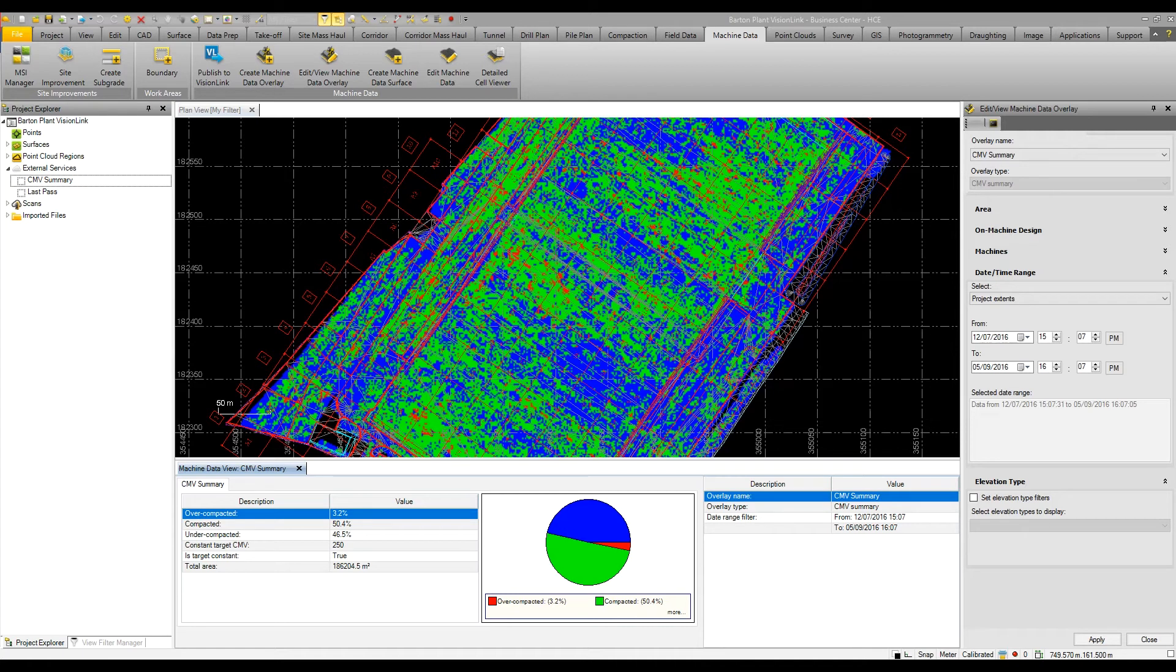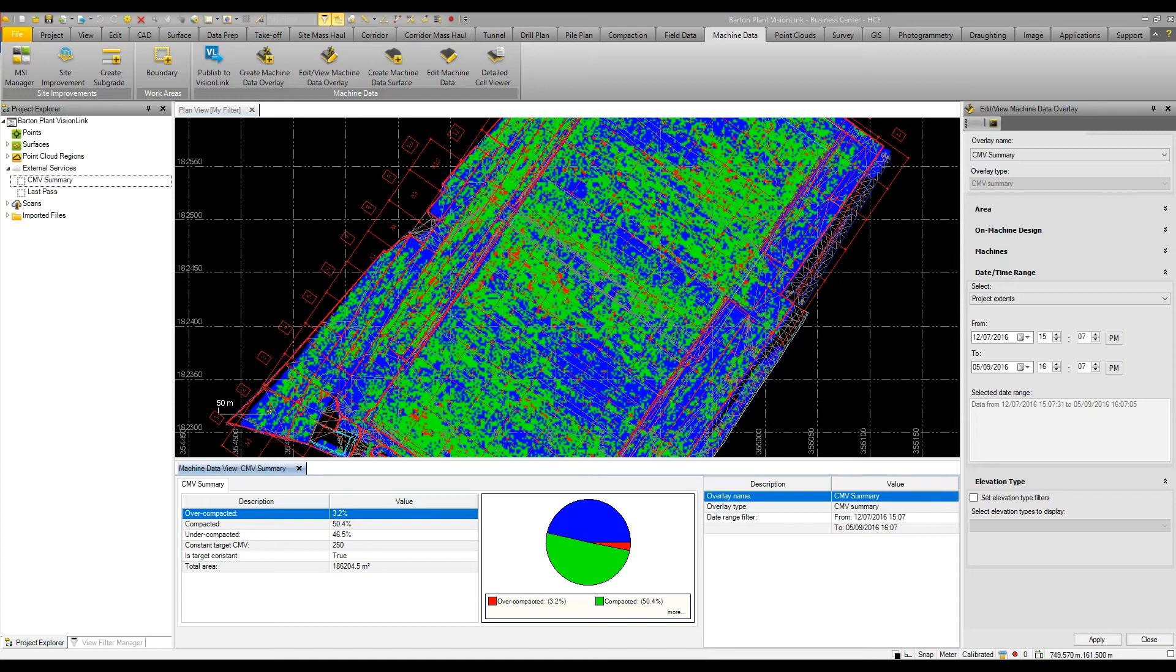What we can view here is we have some compaction data from CCS 900 that's gone into Vision Link, that's then been overlaid in Business Center. So I can highlight compaction soft spots in blue. If there's any areas that may have been over-rolled, they might appear in red, or they're just a lot harder than other areas.